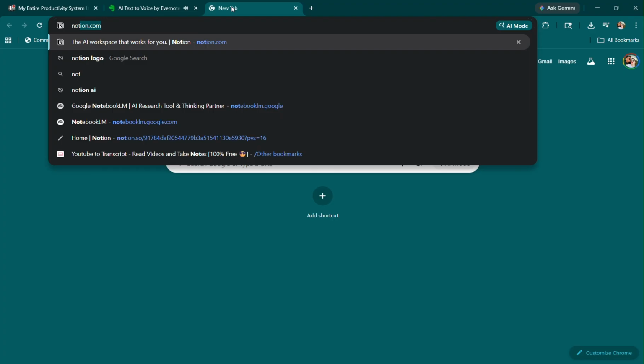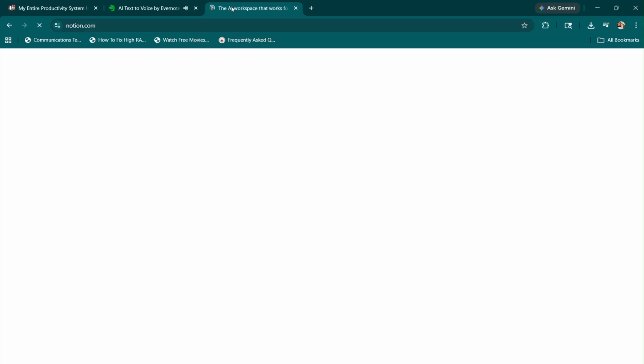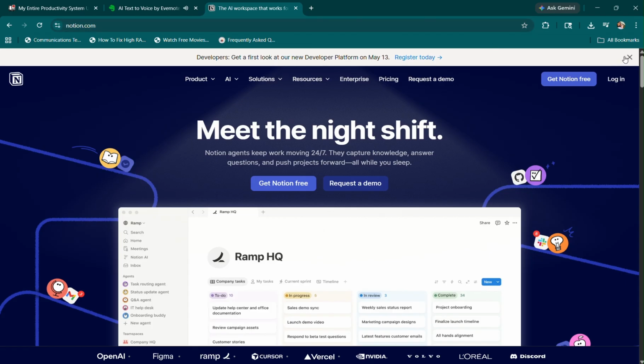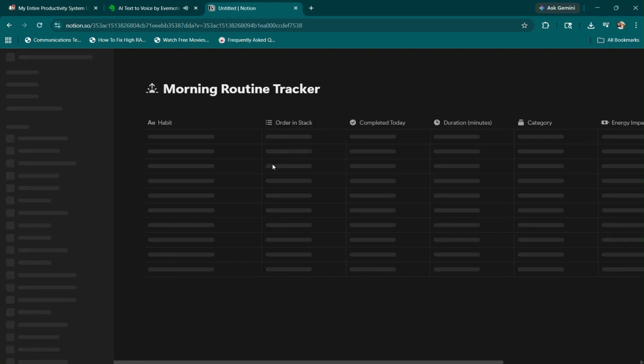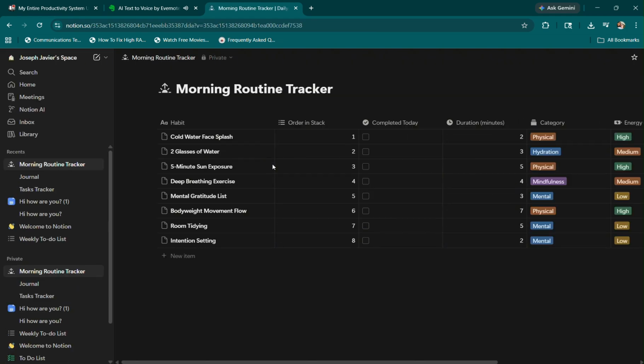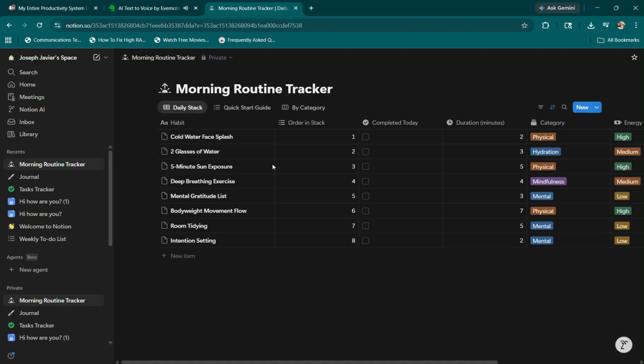Let us start with Notion, because this is where every project begins. Notion is a free browser-based workspace that combines notes, databases, and documents in one place. You go to notion.so, sign up with a free account, and you have a blank canvas to build your planning system. Here is how Notion fits into this workflow specifically. The content calendar and project planning. Build a database in Notion to map out everything you are working on. Each entry in the database is a project or a piece of content. Give it a title, a status, a deadline, and a category. This is your master plan.